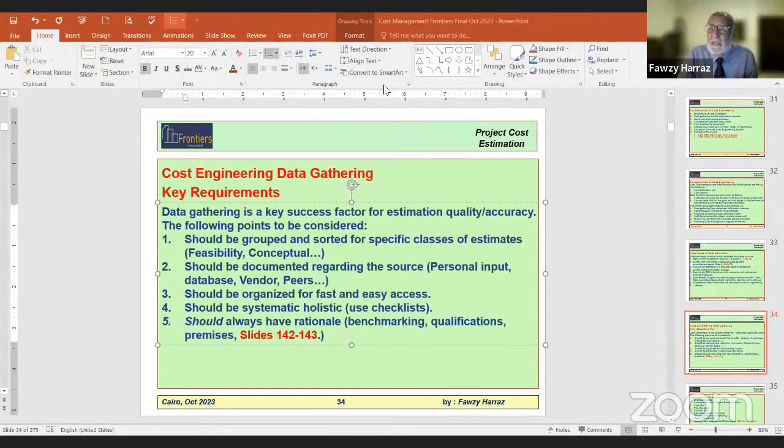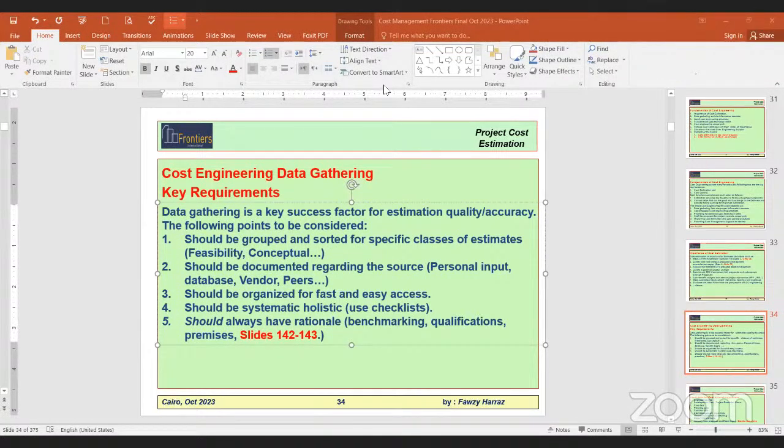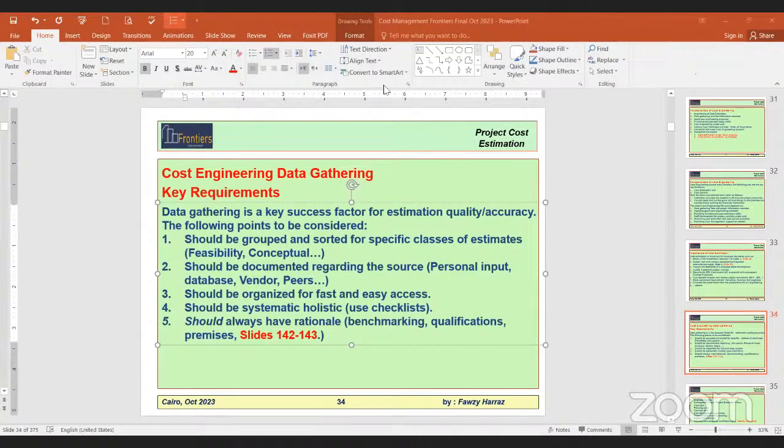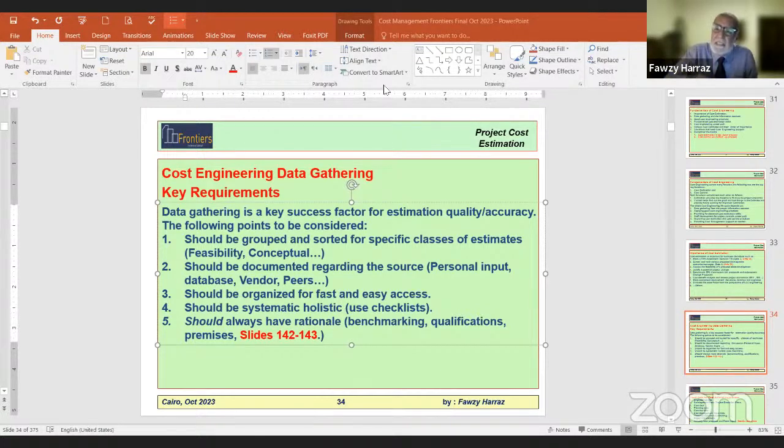But for sure, your estimate can be inaccurate within 200 million in 1 billion. That's 20%. It's a big range. Your exercise cannot be as bad as 20%, even if you miss many items. That's the importance of your own internal estimate: to give you a guide on the bid prices, whether they are really reasonable and the difference is due to accuracy, or there is something else. And the worst would be if your estimate is 1 billion and you receive a bid for 750 million. Definitely, this is a toxic bid. This is a big problem.